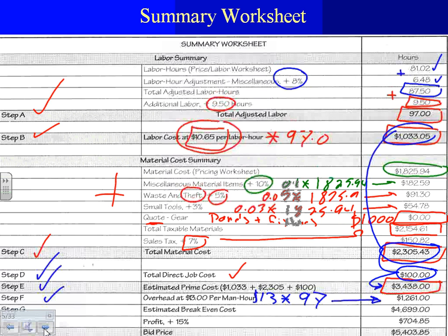Okay, then now you add these two together and you get yourself the break-even cost. The break-even cost, now it will cost me close to $4,700 to do this job. I will pay the project manager, I will cover all my overhead and all my labor, all my material, but I will make zero money for the owner of the company, who does not carry tools, does not do anything. Zero money, unless I am the project manager who is also the owner of the company. But the owner of the company will get zero money up to this point, right? Because we just paid our expenses.